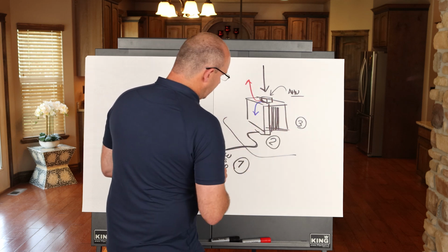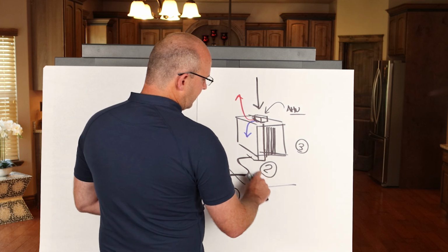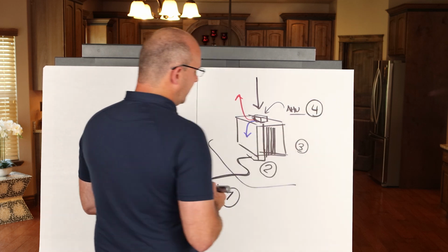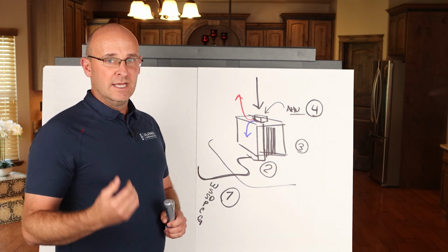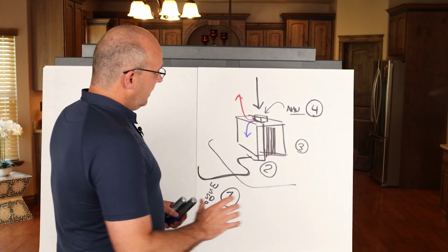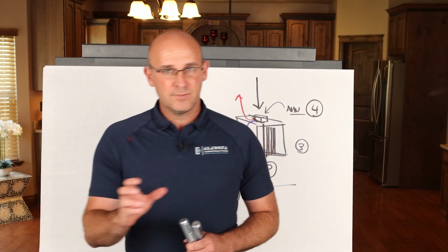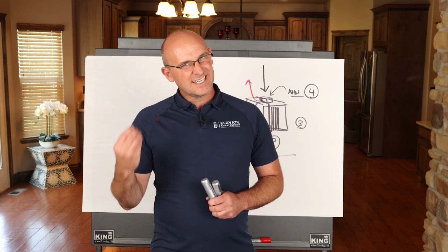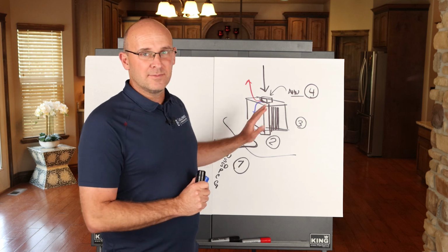So this is how I look at it: step number 1, utilities to the building, through the entry rooms, vertically, and then step number 4, to the actual HVAC system so it's operating and you can start to commission this system as a whole. So this is a very nice way to look at it. This is not zone by zone, systematic, easily broken out, consistent schedule type work. This is not zone by zone. This is system by system.